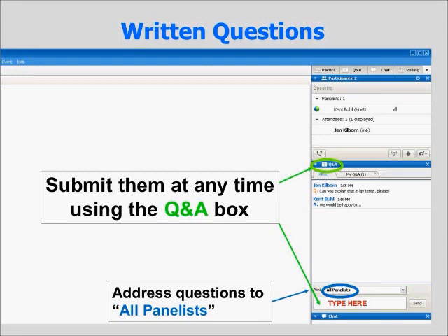I'm suggesting that not just on a project-by-project basis, but I would write them an initial contact letter or email and say, hey, this is what we're thinking of doing, and what do you generally want to look at? And let's try and reach an agreement on how this will be handled. And that way, you may be able to get a sign-off that's blanket for a whole class of actions and avoid individual contacts and waiting 30 days for individual projects.